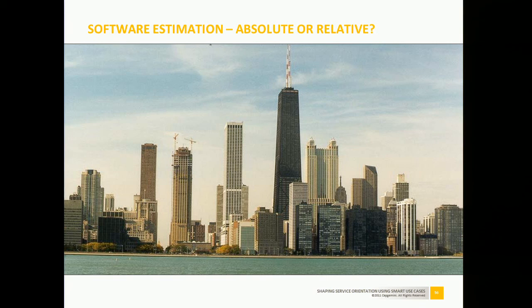That might be a good answer. And what about this one? And this one? Sort of 2. We only use whole numbers, so this is probably a 2. So this will be a 1. So using this relative scale will allow you to estimate the total height of this picture within a minute, literally within the minute.